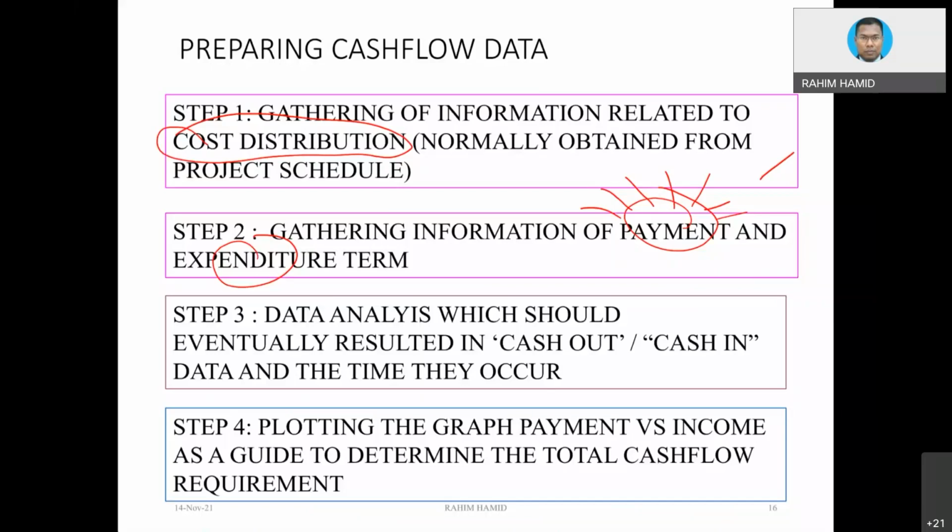tabung, that the client will hold the money for the sake of using the money if, for instance, you fail to fulfill the obligation during the defect liability period, but the money basically belongs to you and will be returned later on according to the contract terms. So this is what I mean, okay? So in terms of payment, sorry.